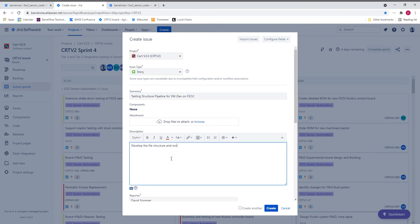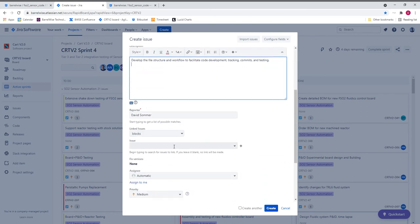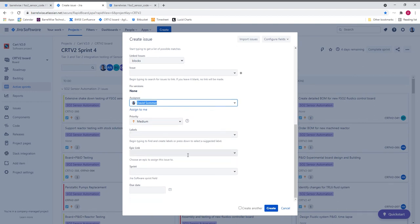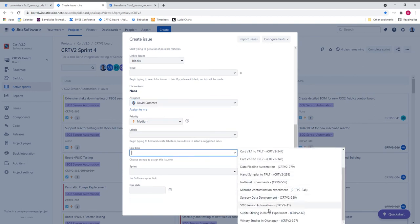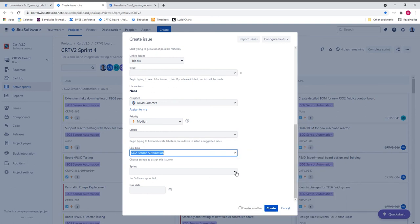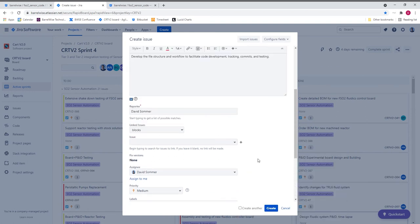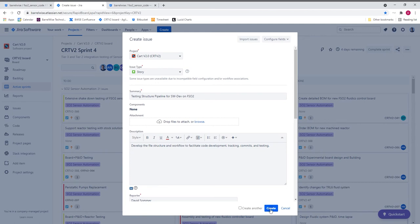In this story we need to describe what needs to be done and importantly how we know when it is done. We also need to capture the resources required to execute this piece of work. In this case it will be me, and I need to work with the rest of the team to allocate a time estimate for this issue. I'm also going to assign this issue to an epic so it is tracked correctly and is given context with the other activities on this project.